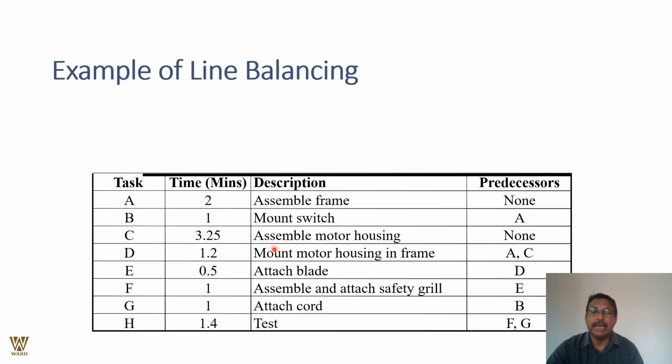But for D, it is the completion of A and C. When A and C complete, only then can D start their work. Similarly, E has a precedence of D to be completed.